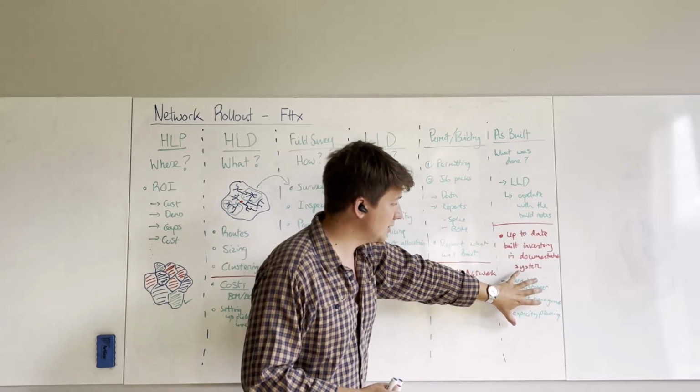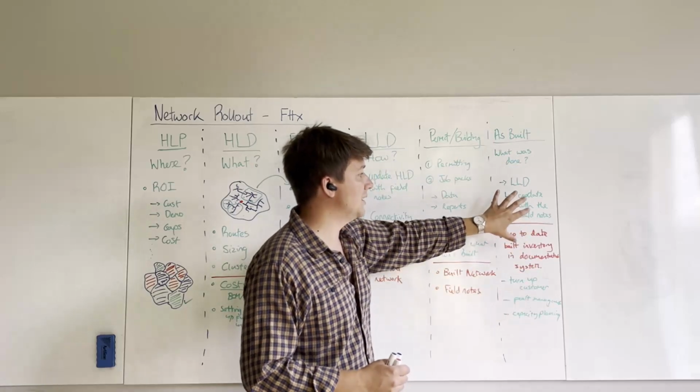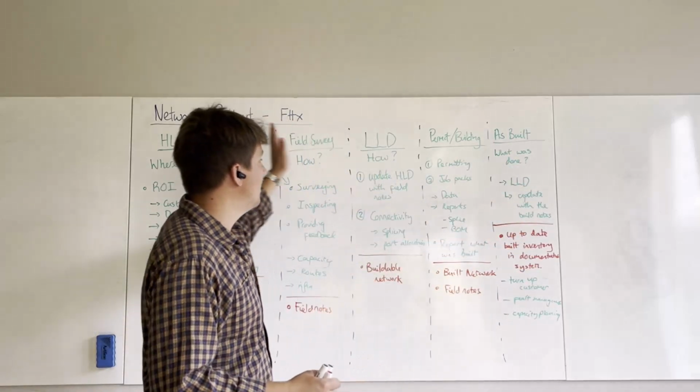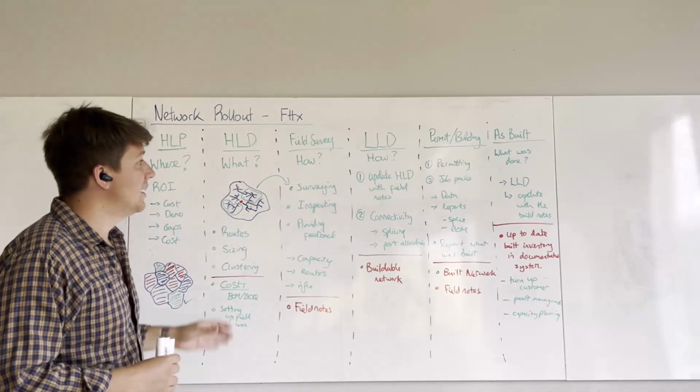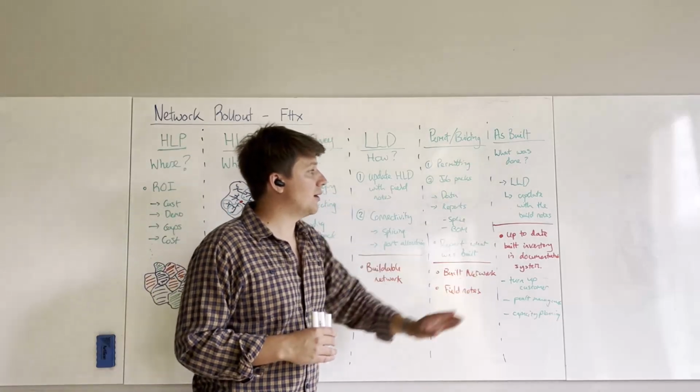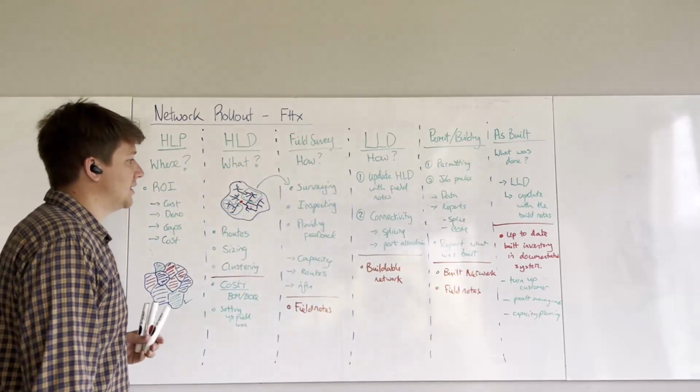when you can't answer these questions very well, and you have to go back in and somehow try to clean up this data by sending people out into the field to do surveying and inspecting. So do it all the time whilst going through, otherwise you're going to have serious issues there.